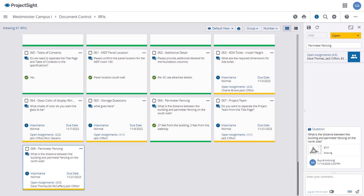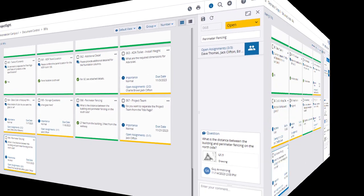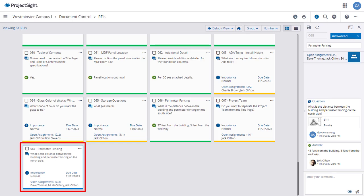The Assignees will receive emails with the question and links to the RFI. And when the RFI is answered, you will see the response in the record. When one of the Assignees answers the RFI, the Answered RFI will appear on the RFI main page and as we can see from the blue status bar at the bottom of the tile, the Assignee also changed the status to Answered.